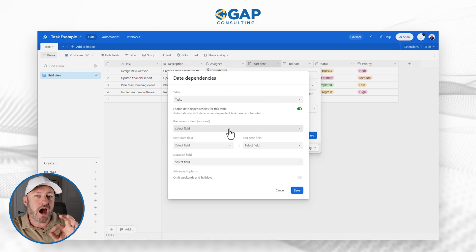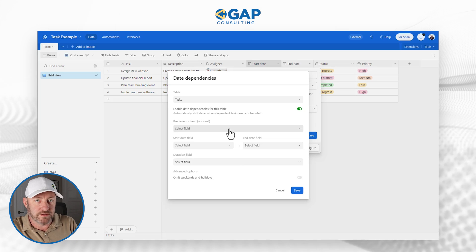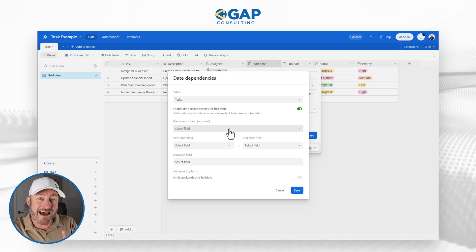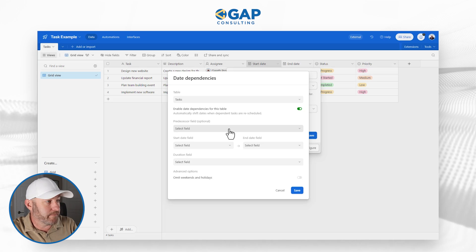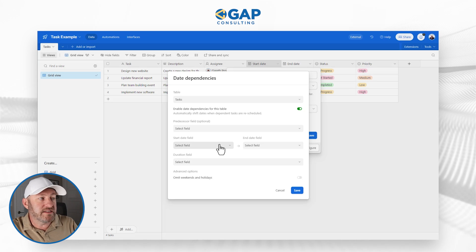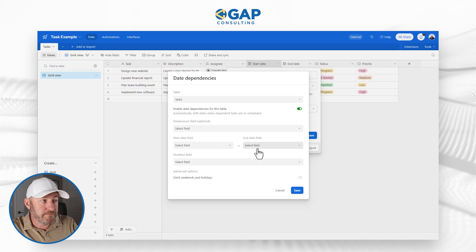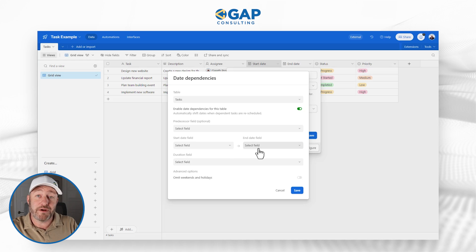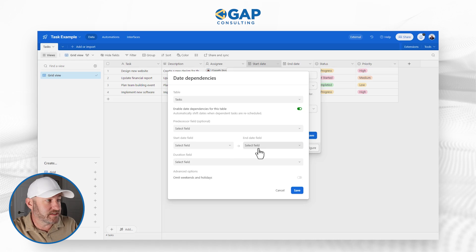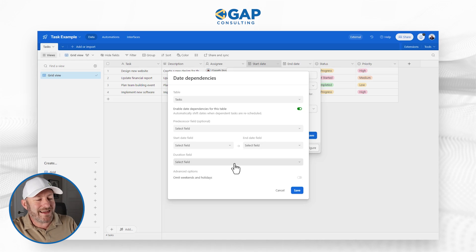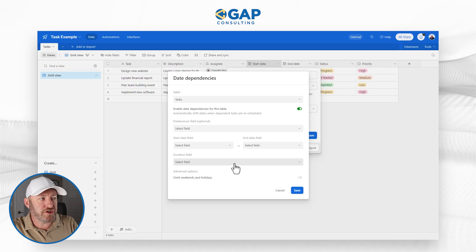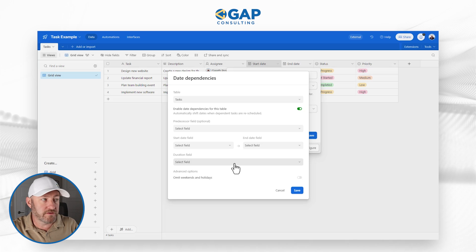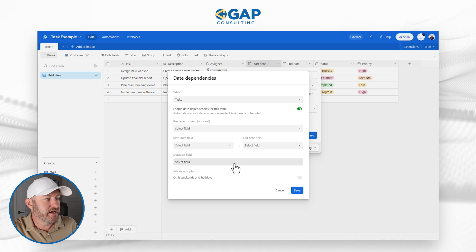Now number one, we have an optional predecessor field. I am going to demonstrate this, but not in my first example. We need a start date field, we need an end date field, we already have both of these, but we do not have a duration field. This is a required field for this.